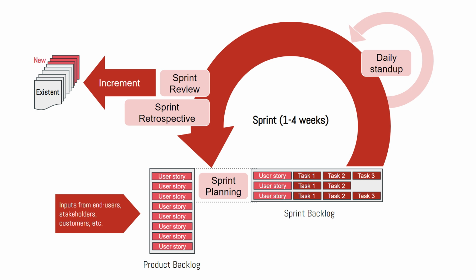And by the end of the sprint, there is a sprint review meeting. And during this meeting, the development team demonstrate what they have developed so far, what they have produced, and the product owner and other stakeholders could give them feedback and approve or reject the developed product.